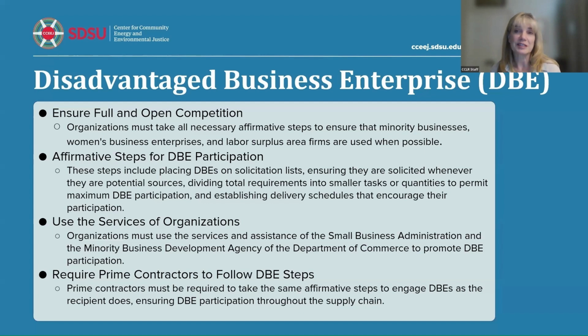Okay, disadvantaged business enterprise, DBE. You might also know this as MBE/WBE, which is Minority Business Enterprises and Women Business Enterprises, or collectively DBE. This is very important. There are 4 things here. Ensuring that there is full and open competition, meaning that organizations must take all necessary affirmative steps to ensure that minority businesses, women's business enterprises, and labor surplus area firms are used when possible.